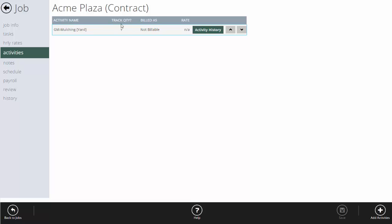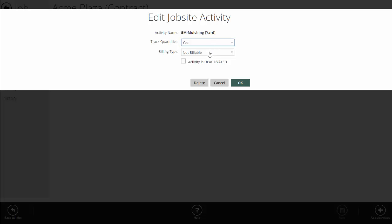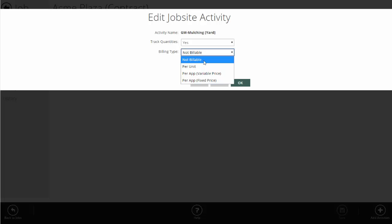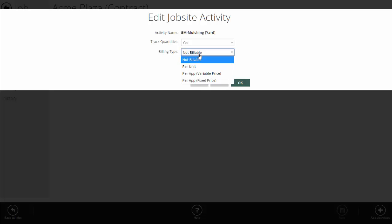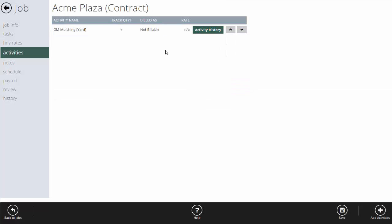I've set up a mulching activity on this job with track quantity turned on. When you set up an activity, it asks for the name, the units, and whether you want to track quantities. If you want to know how many yards of mulch the crew used, make sure track quantities is set to yes. But it doesn't mean you have to bill for it — if this is an all-inclusive contract, I'm going to set it to not billable. If it was billable — say, at a flat rate of $1,200 for mulch — I could set per-application fixed price. Or if billing by the yard, I could set up per unit and charge X dollars per yard. But here we're doing not billable, so I'll leave it at that. This lets me track how much mulch we used without actually billing the client — assuming it's all covered in the contract price.